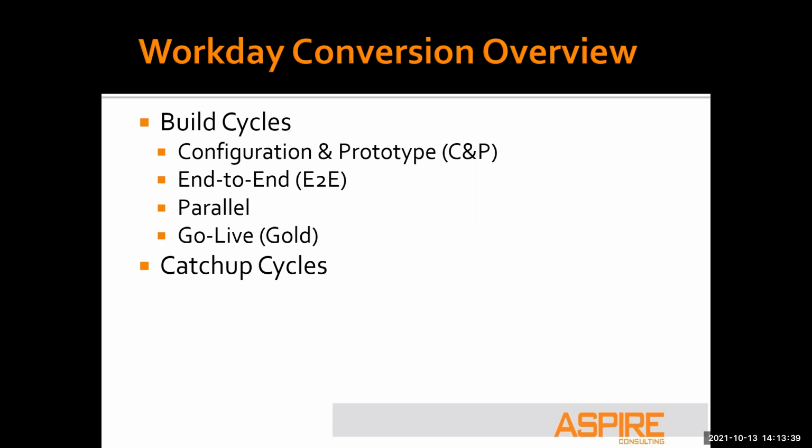So to give yourself a little bit more time to deal with the loading of those files, you'll pull data early, load it into the system, and then you'll come back for a catch-up cycle that will look for any new hires, any people that terminated, and how to handle those with another conversion cycle in Workday.